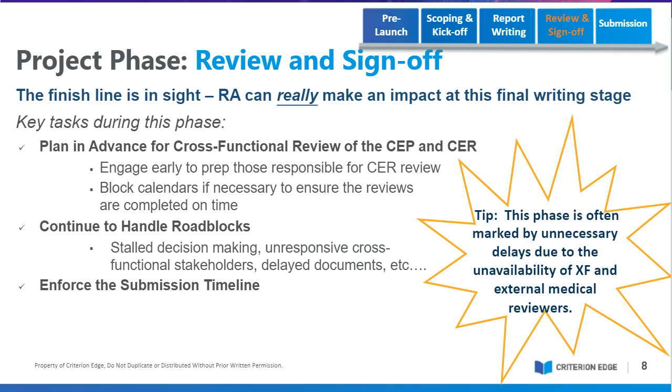It is not just a recitation of the facts. It's a story that begins in the state of the art section and moves through to the risk benefit section. And that's why we always present a full CER for the review, not pieces, because it's like reading chapter 5 in a book, and then reading chapter 1, and then reading the final chapter. The story doesn't make any sense. If you review like that, you review the entire book, and in this case, the entire CER. So it takes time. So engage those people early to block some time.